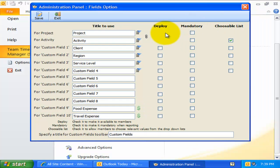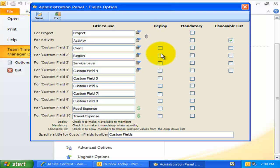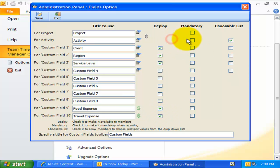The project and activity fields are always deployed to all members, but the custom fields are optional. You can deploy as many custom fields depending on your reporting need. You can also set certain fields as required, such that individual members cannot submit their timesheets if any of these mandatory fields are not filled.